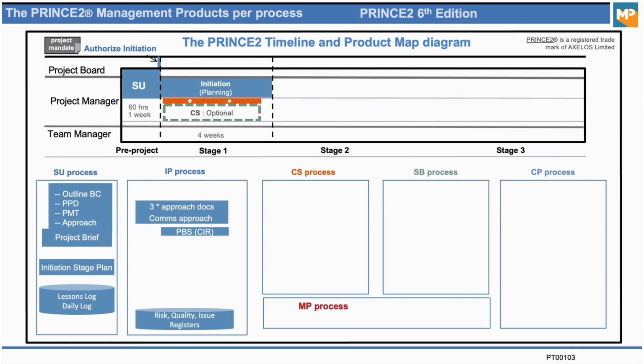It's like an organogram, and that can take a couple of workshops to do as well, which are facilitated by the project manager. Then for most of the items that were broken down, we create a product description. So this is the requirements documents which are created. And again, the project manager will facilitate this, ask the questions to the users, what do you want, and then get the technical people to say what's possible and what's not possible.